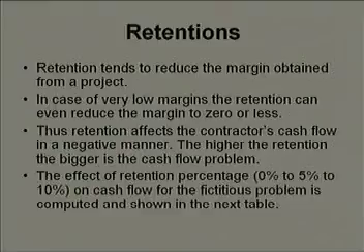Now, it is interesting to note that in case of very low margins, suppose you are quoting a project at let us say 2%, 3%, sometimes that is also done. If you find that the market has a lot of competition and you do not have enough jobs to keep your employees and your plant and equipment in running condition, in such cases sometimes contractors do quote at a lesser margin.